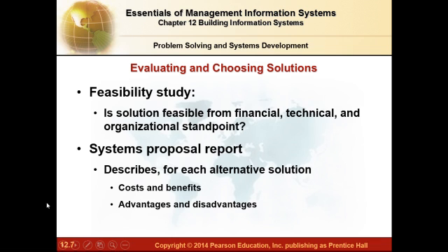Okay? So the system proposal report describes for each alternative solution the cost and benefit, advantages and disadvantages. Too often organizations underestimate the cost of a new system, especially when it comes to people, training, downtime, lost productivity, and employee disruption. The feasibility study will help determine the economic feasibility of the idea. Okay? Some things got to give with the new system. What are the changes? Who will manage them? And how will they be incorporated into the existing organizational structure? How much change can the organization handle monetarily and emotionally? Those are the questions that the operational feasibility study will help you answer.